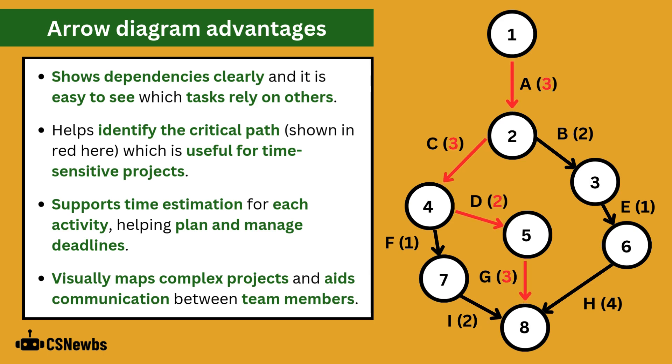Adding up the expected duration for the activities on the critical path in this example gives 11 days so the development team knows that it will take a minimum of 11 days to complete the project which is good for setting deadlines and expected time frames.